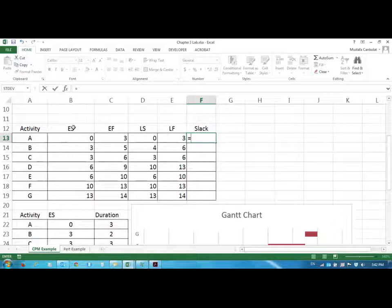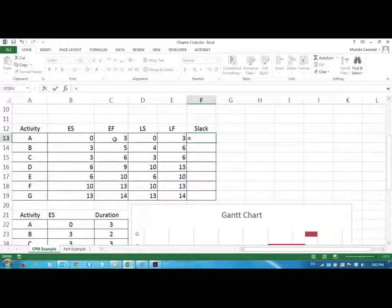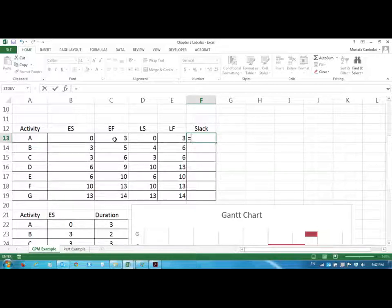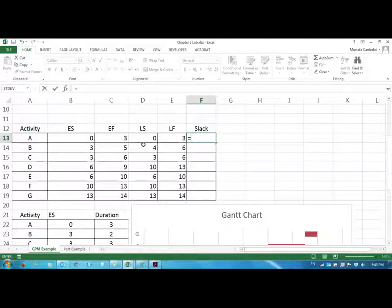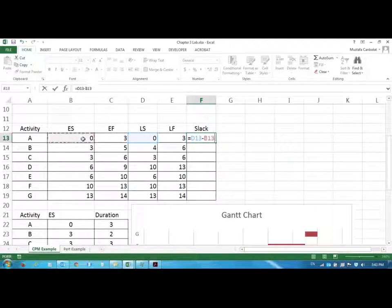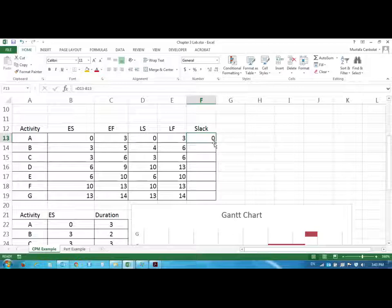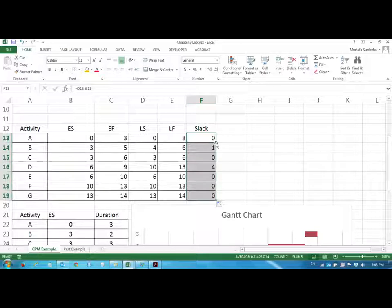So slack is the difference between the late start and early start or the difference between the late finish and early finish. You can take either one of these. It has to be the same number. So if the late start and early start difference is a different number, whereas late finish minus early finish is another number, that means you're in trouble. Your values are wrong. So I'm going to take the late start minus early start. And the slack is zero. And double click.